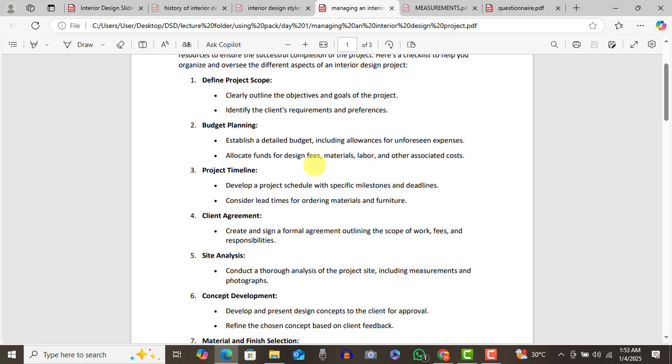So you see, the best thing, like you are saying, is to try to have your charges at every stage. Exactly. The moment you are doing an estimate and all those things, say there is an introductory fee for this section, like how I'll come to sites and all those things. Even before the project has started, I'm spending time for your work, and this is my charge. If it's 1,000 cedis, 500, whatever it is, that's the distance. Give them an invoice for it. Let them pay for it. So that if they take the estimate and go and give it to somebody else, you know you have been paid for your time.